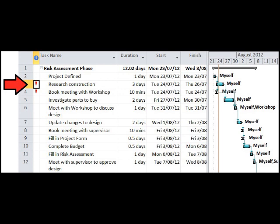You'll notice that if you have an over-allocation of resources, a warning is displayed in the information column. If you right click on the warning icon, MS Project can help you resolve the issue.